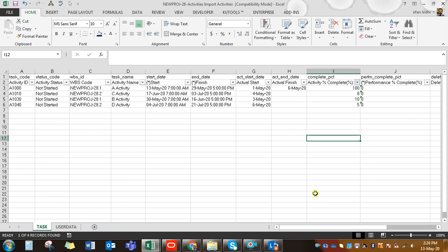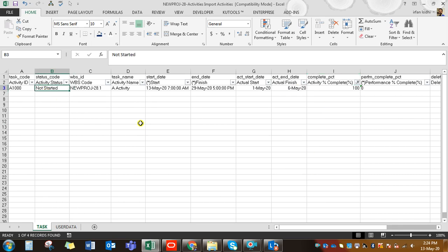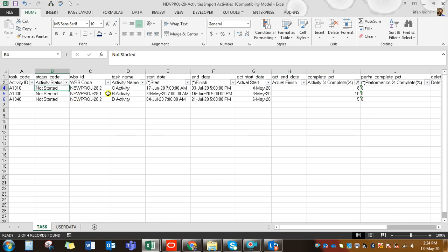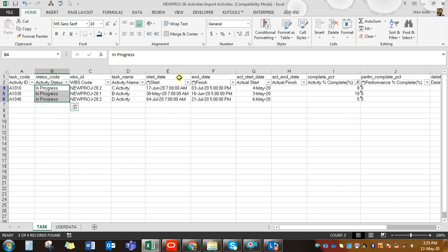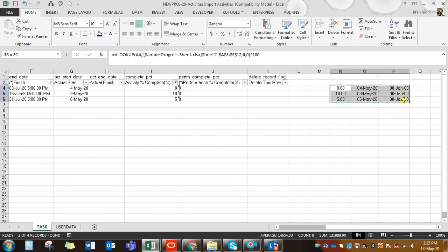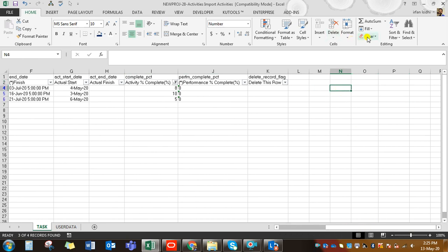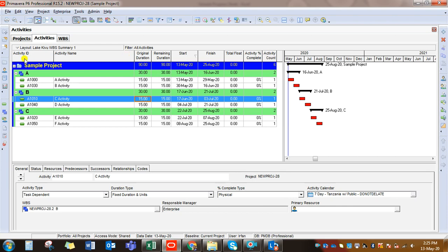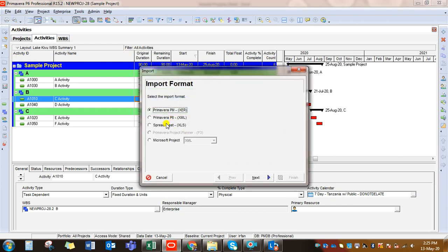Select the activity that is at 100% — meaning it is completed — and change the Activity Status to 'Completed,' then remove the 100% value from the percent field. Select the other in-progress activities and set their status to 'In Progress.' Remove the VLOOKUP formulas we applied to get the values, and do a final check of all values. Save the file and close it.